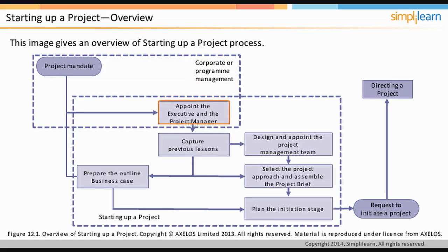The corporate or program management appoints the executive and the project manager. The project manager can also be appointed by the executive. The project manager captures previous lessons. During this process, the structure of the project management team is designed and appointed.